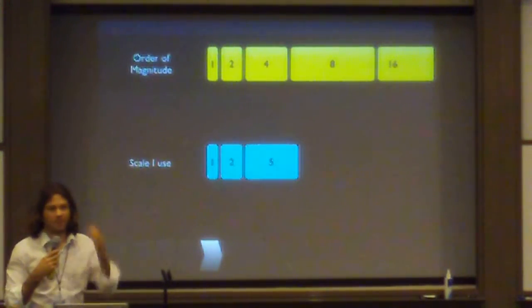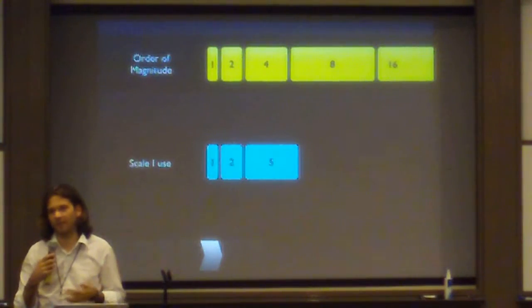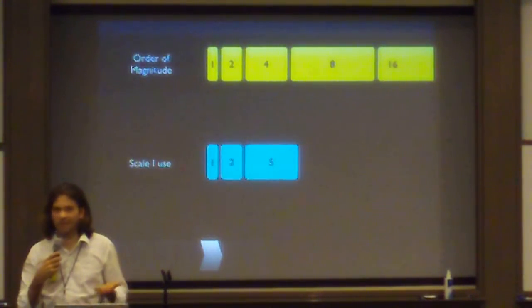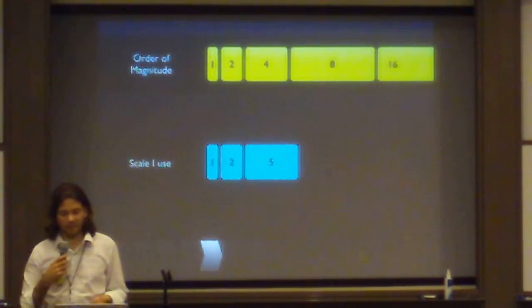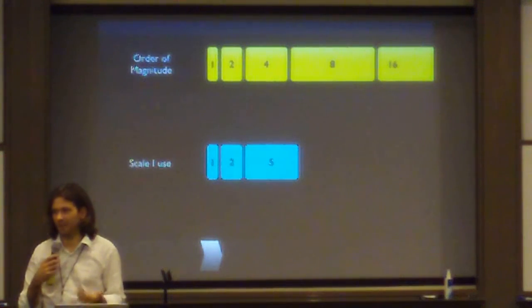One of the advantages of this one is it can generate nicer numbers. If you go with 1, 2, 5, 10, 20, and so on, it will have nicer sums in the end. Yeah. And I also think it is an order of magnitude really, because the step between 2 and 5 is kind of big.